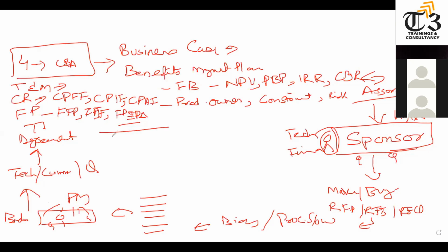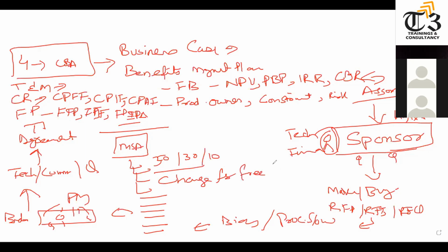In Agile, we have different types of contracts where we can make a master service agreement for the whole project, and then for each iteration or each level, we could have different addendums, like variable rate projects. Like if you finish early, you will get 20 riyal per hour. If you finish on time, you will get, say, 15 riyal per hour. If you go further and finish late, you will get, let's say, 10 riyal per hour.